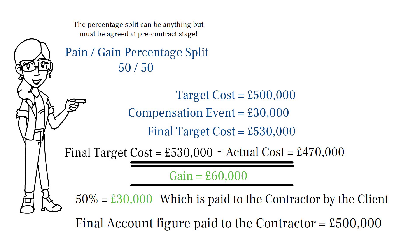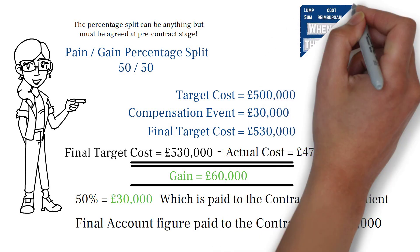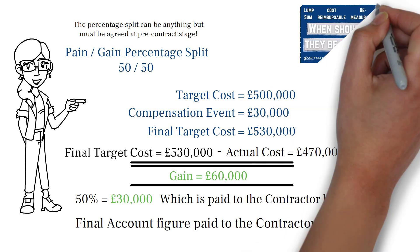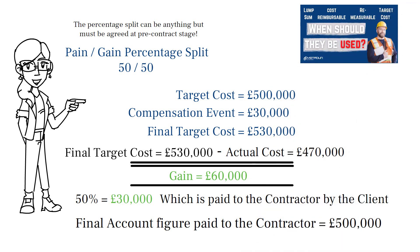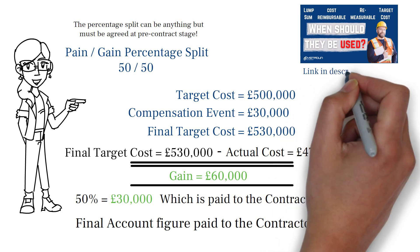The premise behind this type of payment is hoped to incentivise the contractor to bring the project under the target cost as much as practically possible, to achieve a bonus payment for themselves, and it also gives a saving back to the client over their original budget. For more on the pros and cons of a target cost contract, why not check out our Construction Contracts Compared video. We'll pop the link in the description below.